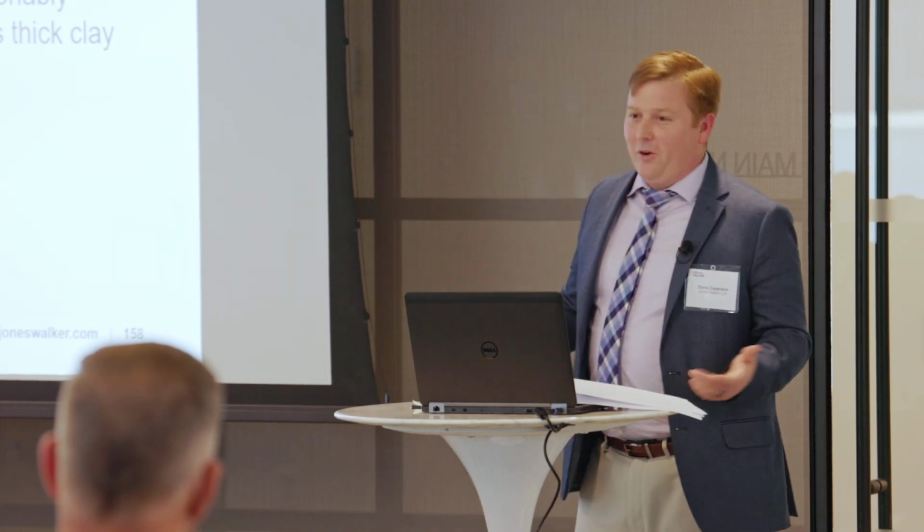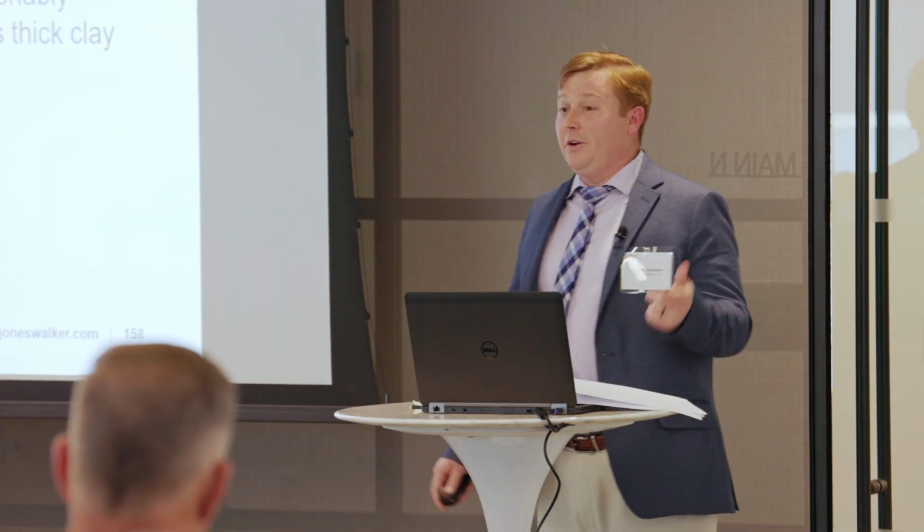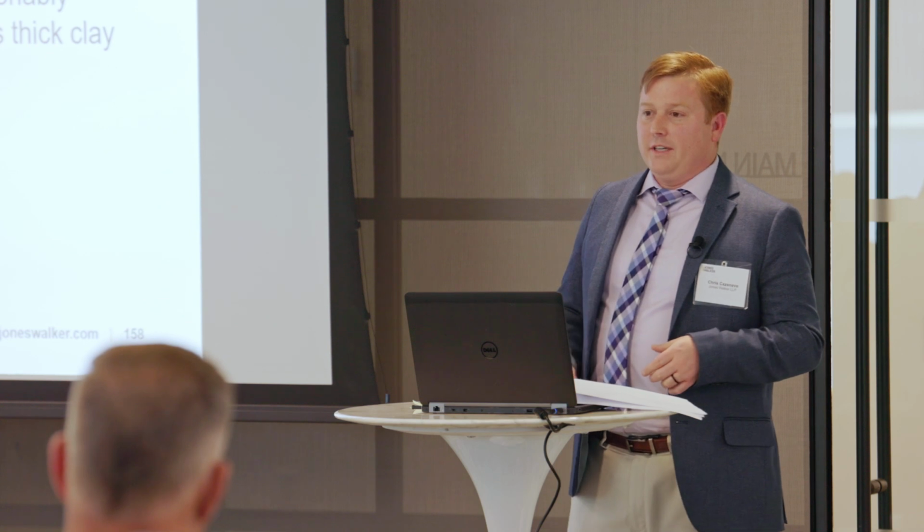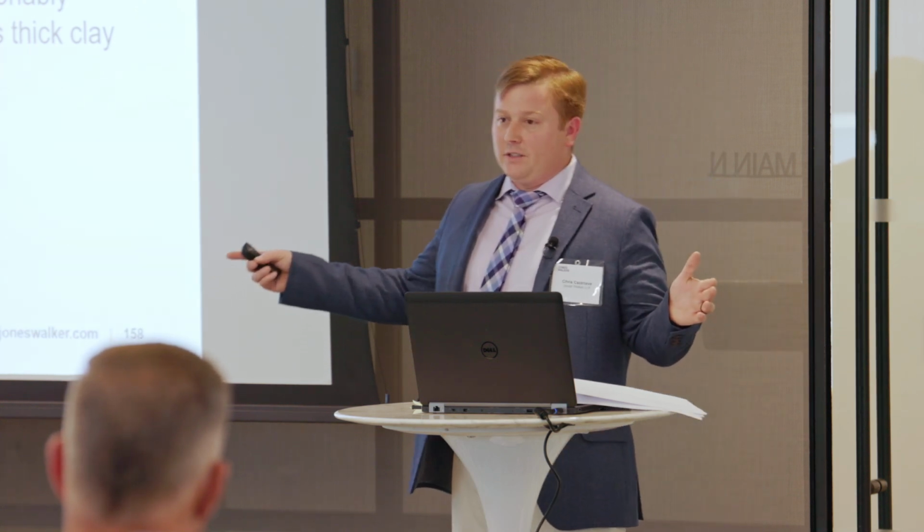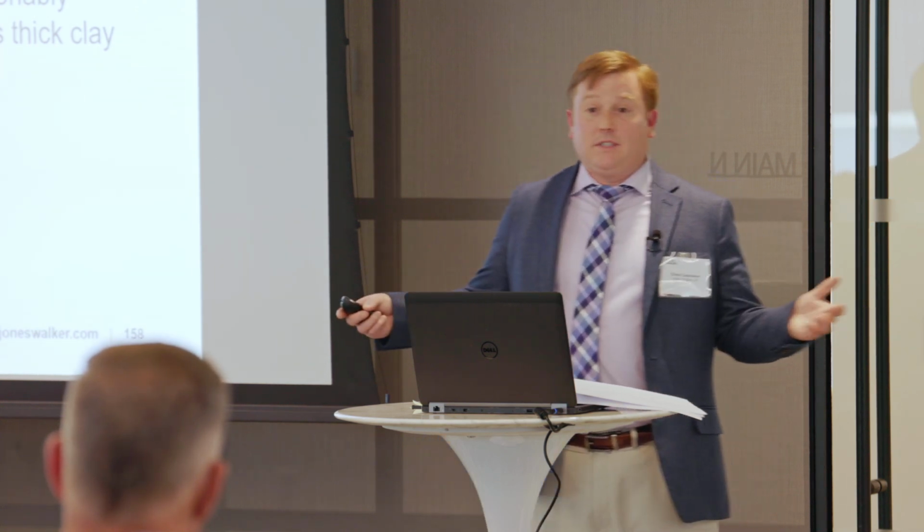But we keep going. Superior knowledge: we knew that this was just one project of many projects along this stretch, and we wanted to see whether or not the government had disclosed in the solicitation that clay was going to be an issue, whether or not they were aware that other contractors were in fact having problems with continuous clay lenses. And ultimately, we didn't find that. And a defective spec, I'll skip that one.